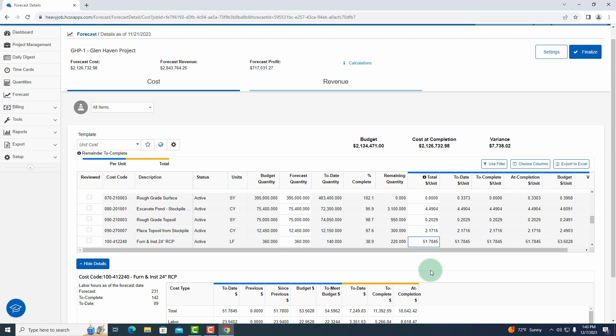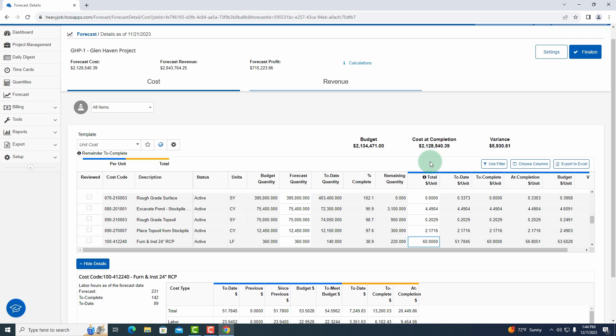So what I'm going to do now, I'm going to go ahead and raise it and I'm going to say $60 just so we can see this cost at completion go up a little bit. As I change that to $60, you're going to see this number go up. You can see it went from $126,000 to $128,000, so it added $2,000 to the cost at completion.